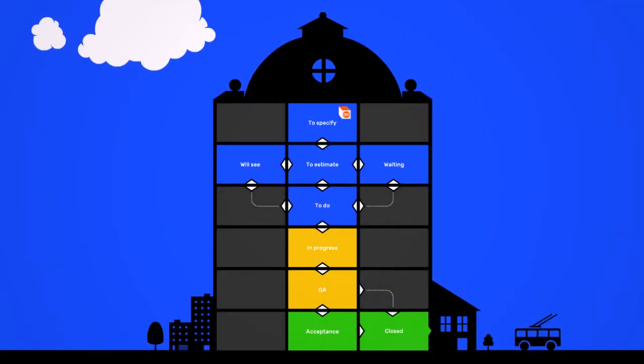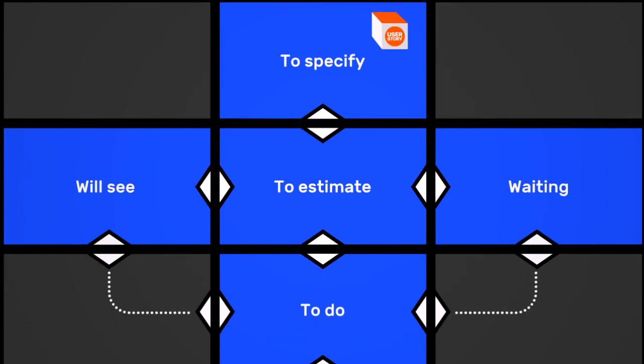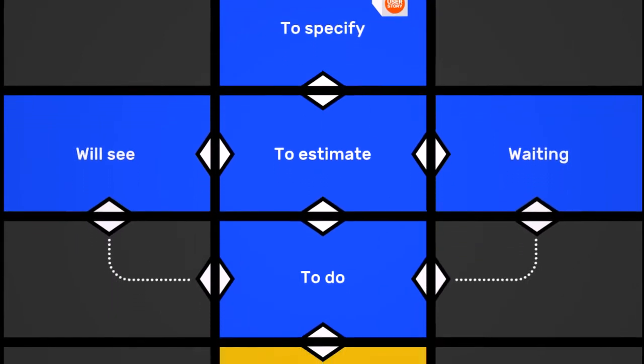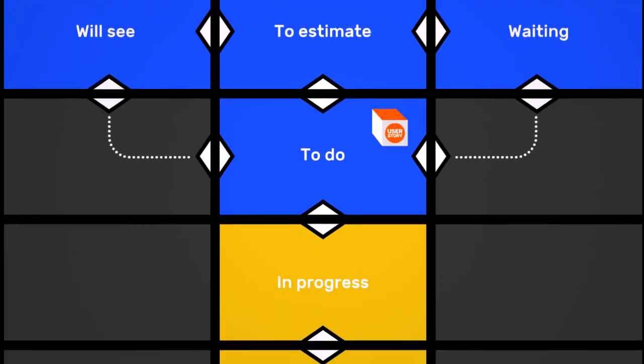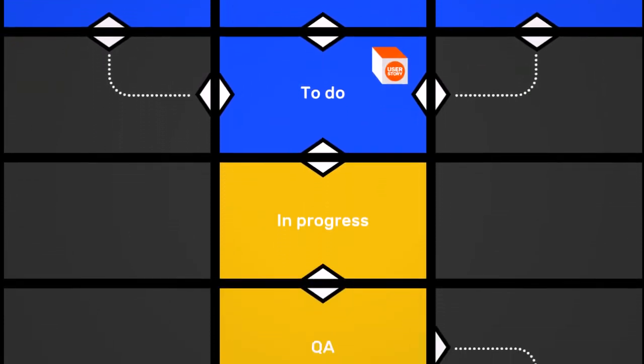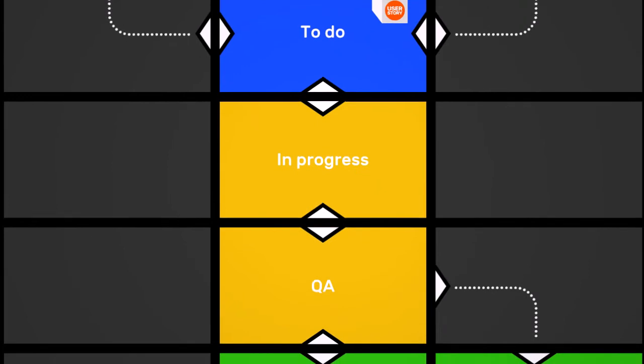The three general stages are divided into more detailed statuses of Nomtek standard workflow, where each user story always has one of the statuses assigned. As it is very expensive to discover and repair problems at the wrong stage, the key to our quality process are the takeover procedures between the stages.